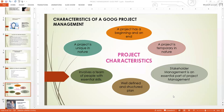Involve a team of people with essential skills. When doing projects and identifying team members, you need to use RACI matrices to identify everyone's responsibilities — what are they going to be doing, and what are they going to be contributing to this project? At times, as a project manager, there is a need to engage more workforce, and you might be part of the hiring team to validate people joining your team.